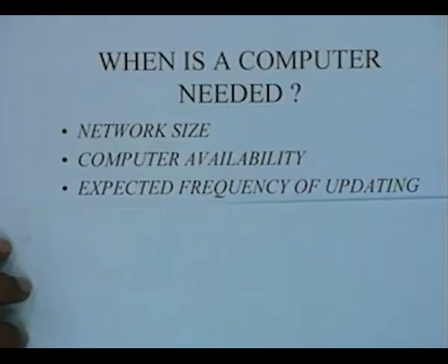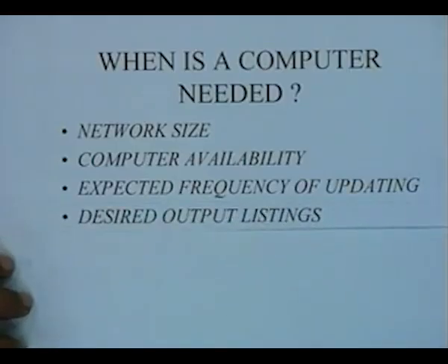So obviously, if this is expected to be done fairly often, if you want to do it only once a year, then of course it's a separate thing. But maybe if you have to do it weekly or monthly even, then of course this frequency of updating actually favors the use of a computer. The higher the frequency of updating, the greater the advantage that you have for using a computer.